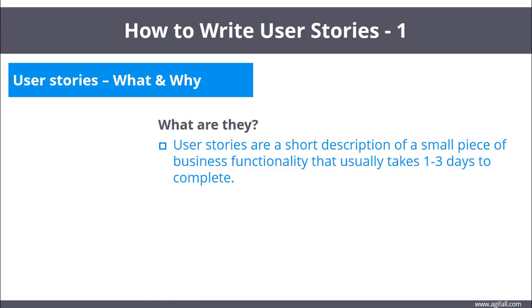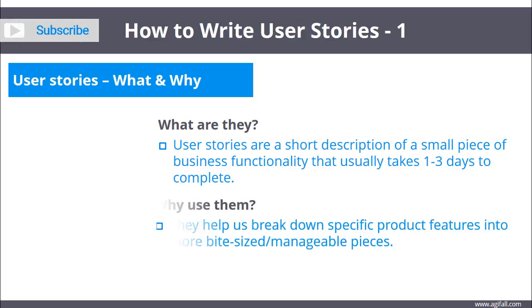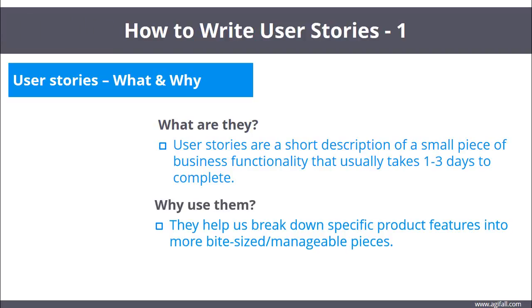First, user stories are a short description of a small piece of business functionality that usually takes one to three days to complete. In many cases, teams will break down specific product features into more manageable, bite-sized pieces and put them on index cards, sticky notes, or into programs like Jira.